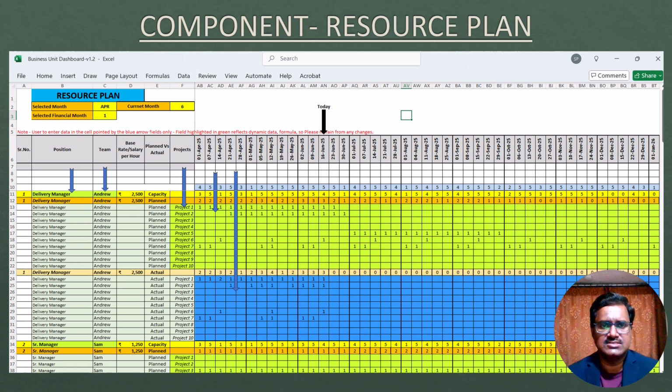The user updates the resource name, label, role, and allocates it to the appropriate project. A new resource can simply be added by copying the rows of a previous resource and updating specific details. At the time of project execution stage, weekly actual efforts in days for each resource against the assigned project are to be mentioned to date.